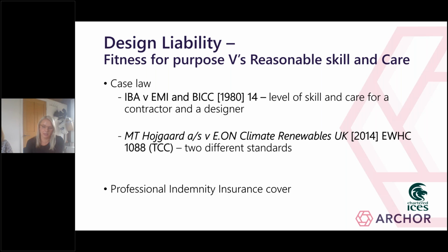The key issue that needed to be decided was which standard of care applied to the contractor's design. In simple terms, there were conflicting clauses in the contract between the parties. One clause said that the contractor was to use reasonable skill and care. However, there was also a provision tucked away in a specification saying that the foundations would have to have a design life of 20 years, and that was seen as a fitness for purpose obligation. The court therefore had to decide what happens when there are conflicting terms, and they came to the conclusion that where there are two conflicting standards, the higher standard applies, and Hogarth was ordered to pay the £23.6 million.